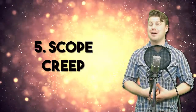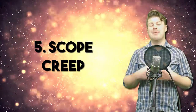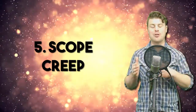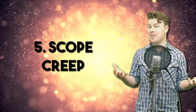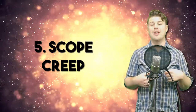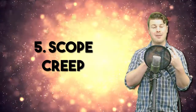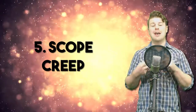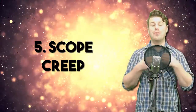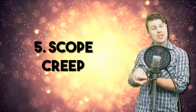Number 5, scope creep. Now, this is not so much an issue of website designers, but more so of the clients that are employing their services. Make sure that you understand exactly what you want from the start of the project. Scope creep is essentially the process by which you keep adding extra things into the project. And time is money for a digital agency or a website design agency, and they can't justify continually doing extra things for you. So make sure at the start of the project you tell them exactly what you want, how it looks, how it will feel, the pages, the amount of content written in those pages, and all level of functionality that you can possibly think of. At this time, at the start of a project, making sure you're very clear on what you want and that it's written into the contract is extremely important for managing both the expectations of the agency as well as your own.